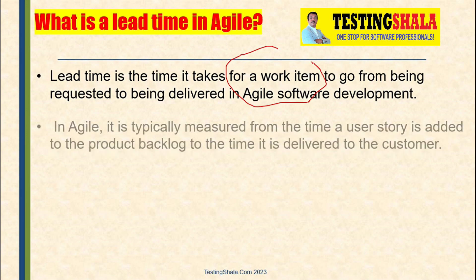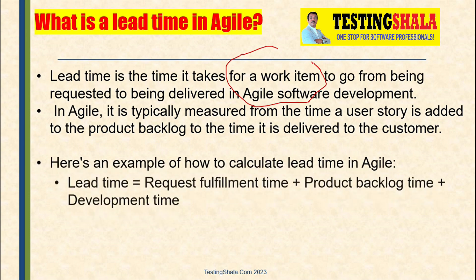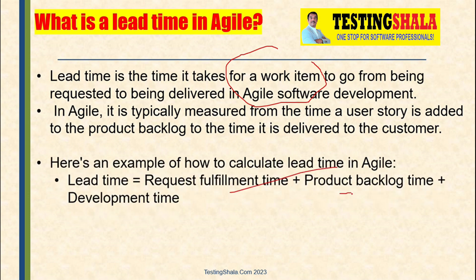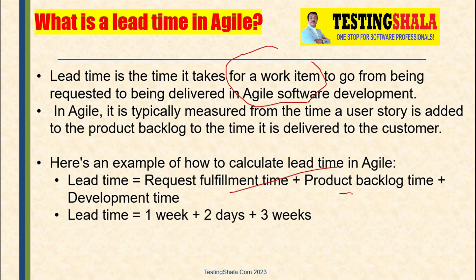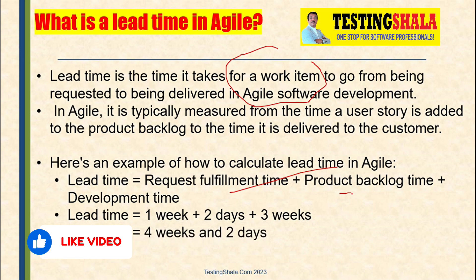Here is how we normally calculate lead time. The lead time starts from when a request is received from the customer and placed in the backlog, through backlog refinement, and then when the scrum team picks up and implements it. For example, requirement fulfillment is one week, product refinement is two days, and implementation is three weeks — so the overall lead time is four weeks and two days. That is the lead time for completing a given work item.